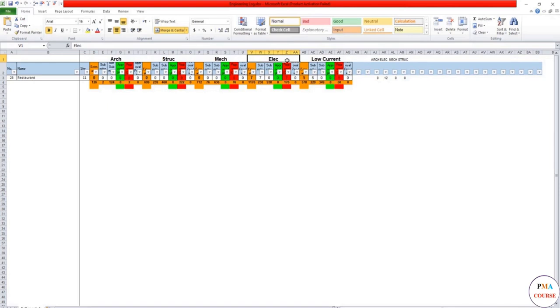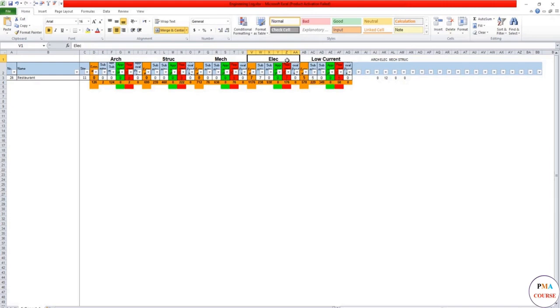But usually it's different. Some projects they separate it because either you as working as a main contractor are going to have an MEP subcontractor with a different low current specialist and you are the one making the coordination. So that's why you want to separate the package. Usually when you have different subcontractors you would like to separate the packages as activities or as work packages for them to better monitor and control their scope of work.